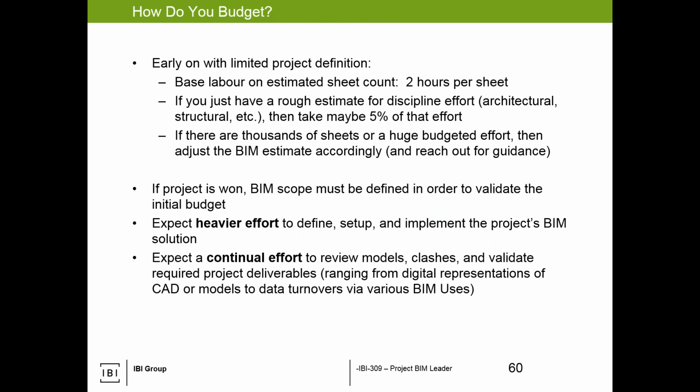And then, well, do you budget it? So if it's happening today, that means it's happening in some form or another. So I've had, very early on in a project where we don't know what the budget is, I've done the work of sheet count. And I said, well, I've seen it in a previous employment, they used to say 40 hours of sheet architectural, 60 hours of sheet structural. We would say, well, 2 hours of sheet BIM. And it would kind of balance out. Sometimes it's more, sometimes it's less, but it was a good estimate as a starting point. You could take a percentage of a discipline effort. If it's thousands of sheets, then a little more thought might have to go in, so reach out for guidance.